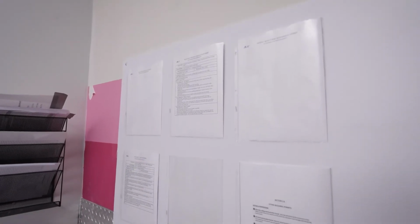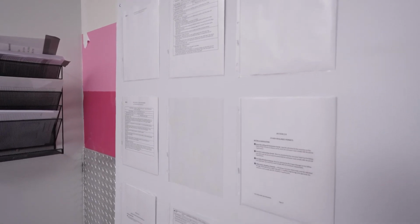No project may commence without first having performed this assessment and without being issued an authorization permit. Projects started without this assessment and approval will be immediately stopped. The pre-construction risk assessment is initiated by the Mount Sinai project manager using our automated safety management platform. Upon final review and approval by all departments, the automated application will generate the final PCRA package. The PCRA package must be printed and posted at the entrance to the job site for review by the Mount Sinai inspection teams, as well as external surveyors and inspectors.